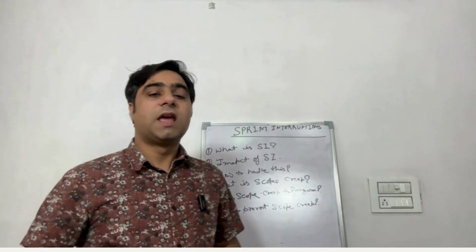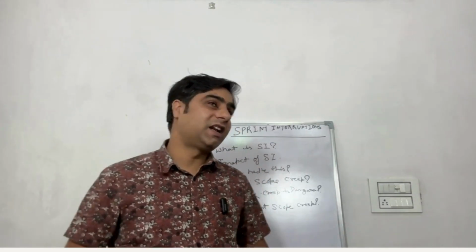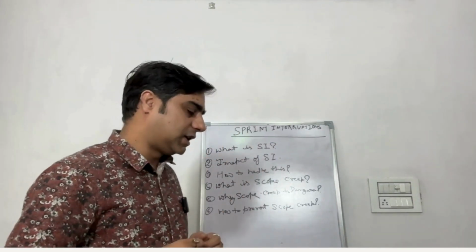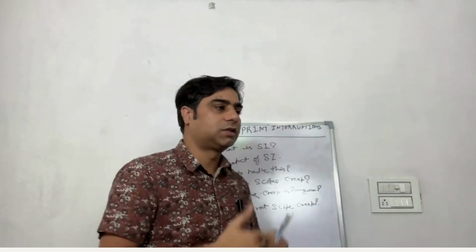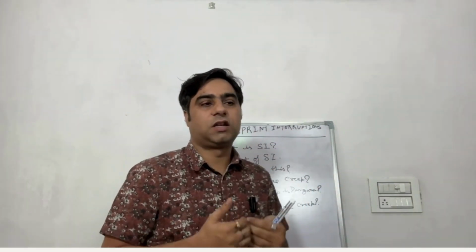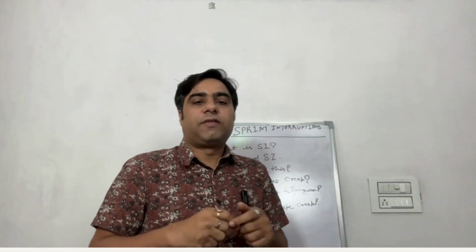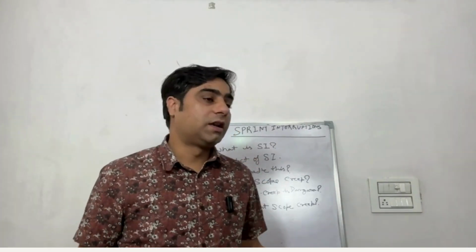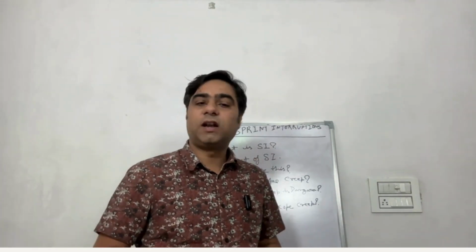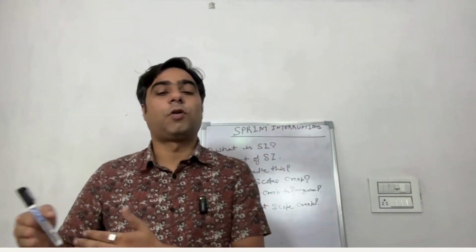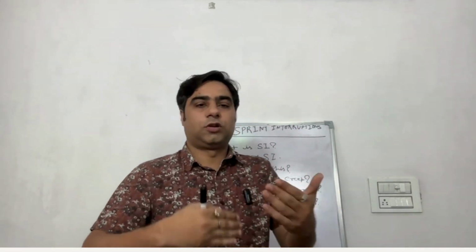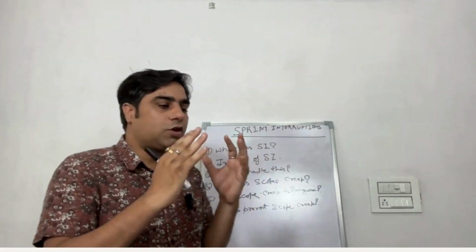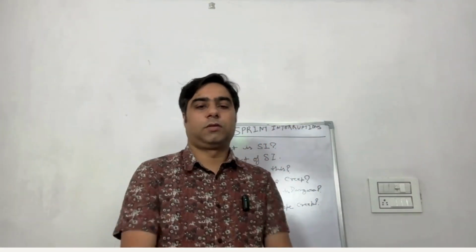The third point is accelerate and protect the sprint. As a scrum master, I go to the stakeholders whoever is requesting for the update or whoever is requesting for the things, and ask them, okay, is this negotiable or is there any possibility of negotiation? Then we negotiate and come to a point. Whatever we do, we have to put into the product backlog or take it, whatever it is. But it is a mutual decision.